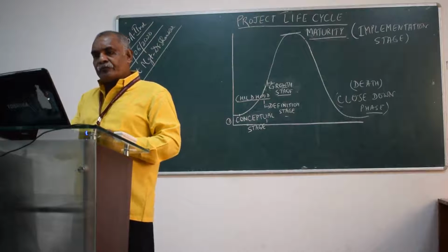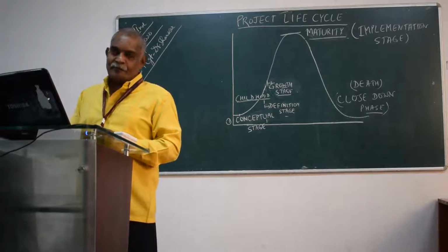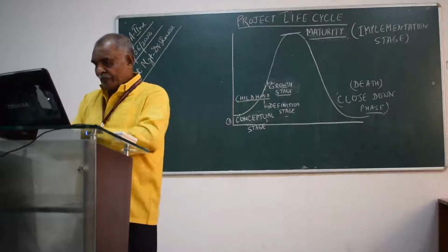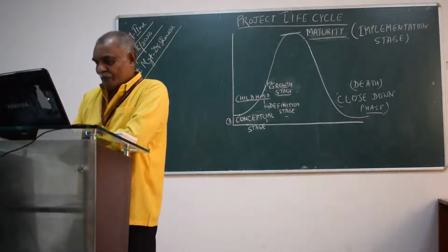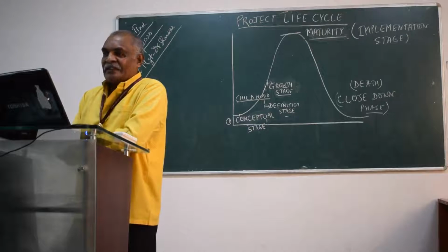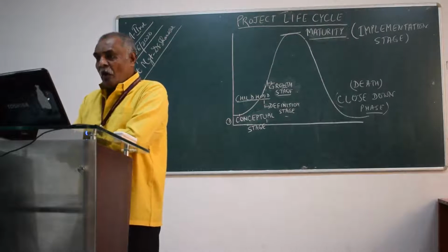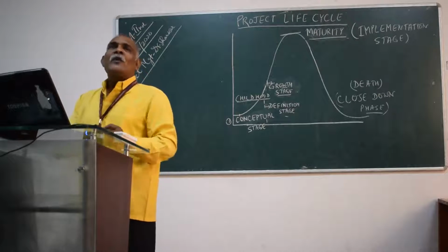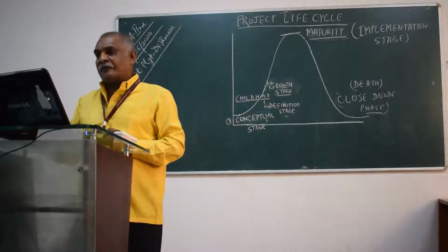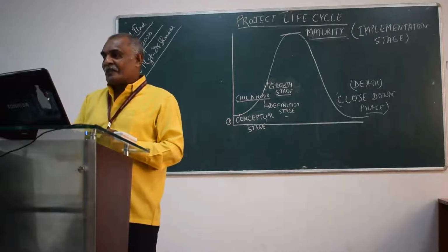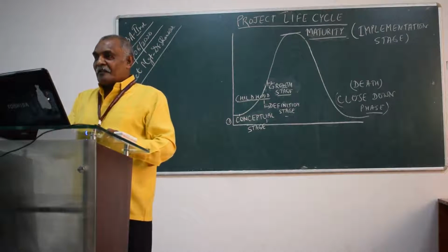Now, we want to discuss the life cycle. The project life cycle, and we can say the work breakdown structure, that is WBS, has come to the forefront in recent years as the key framework or structure for subdividing the project scope of work into manageable phases or work packages, where the work breakdown structure is a hierarchical subdivision of the scope of work. The project life cycle subdivides the scope of work into 6 sequential project phases.